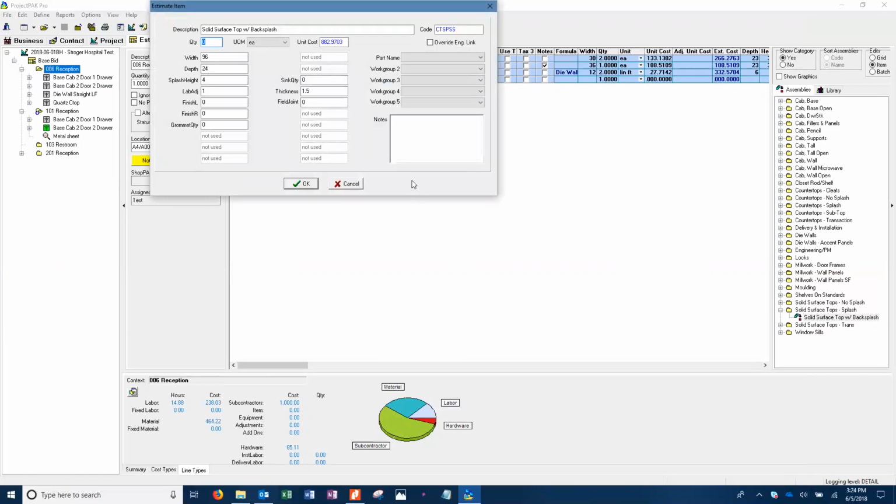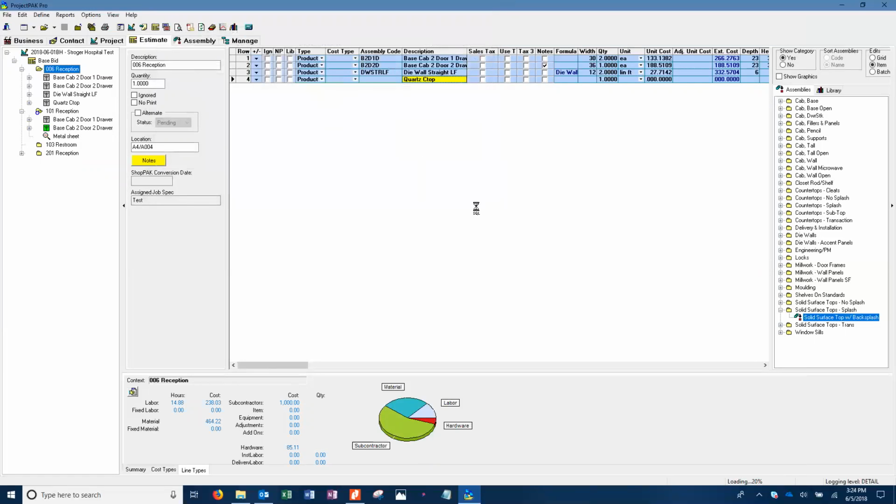Right now it's showing up as 1, because it's an 8-foot piece by 24 inches. So let's say you changed it to a 48-inch piece. The width is 48. And you said okay. Well, guess what? It's not a full sheet. Unless you stock that, you have to buy a full sheet. You don't get to just buy a half a sheet. It doesn't work that way, right?